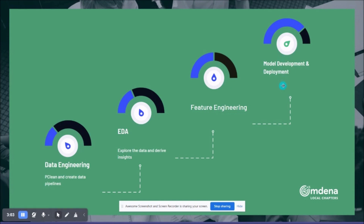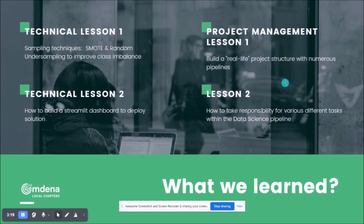This happened over five weeks. The first week was data engineering, the second week was exploratory analysis in each pipeline, then there was some feature engineering, and the final two weeks concerned model development and deployment.